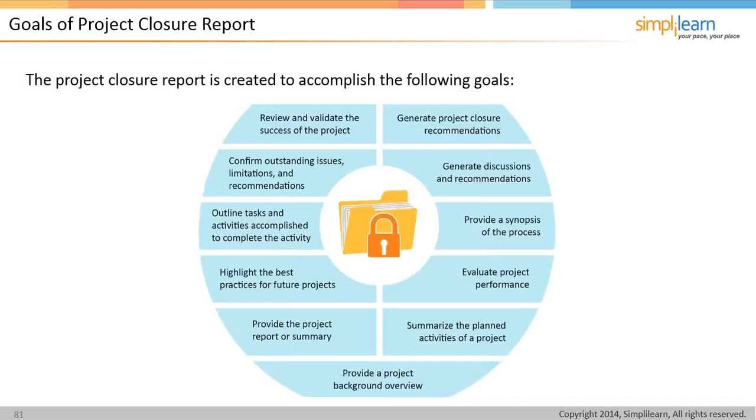You've got an effective and well-documented control plan in place. The team members are all on board with this. They've all signed off on it. The sponsor's happy. You can document how much money the project has generated for the business. And it's not just your say-so or the team members' say-so. You've vetted that through finance, and they've signed off saying, yes, this project created this much money for the business, and we attest to that.